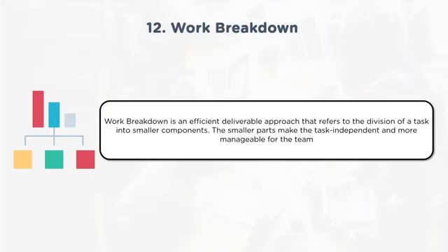So I need to ensure that by breaking down the product into multiple levels, by decomposing it to multiple levels, I am able to visualize the product very clearly. What is there in detail. Once I have the details, I will articulate what that particular work breakdown element, product breakdown element, is. Then I will look at what skills and capabilities are required for that product and I will assign the resources accordingly. So once activities, resources, everything is assigned, automatically this will become a work breakdown structure.